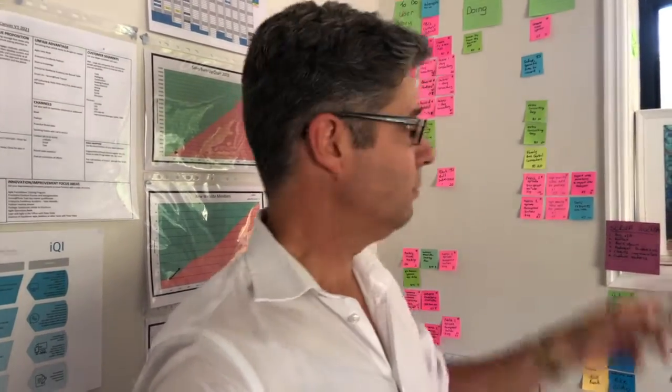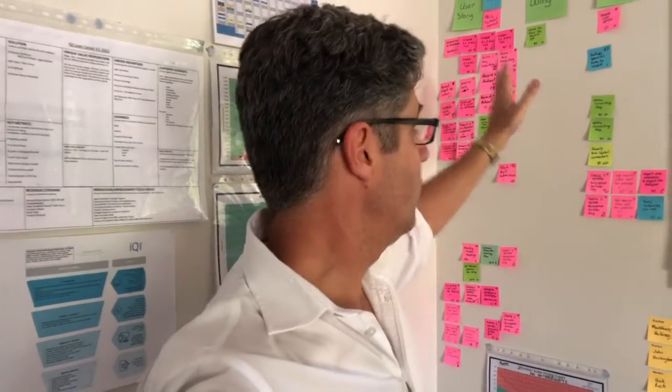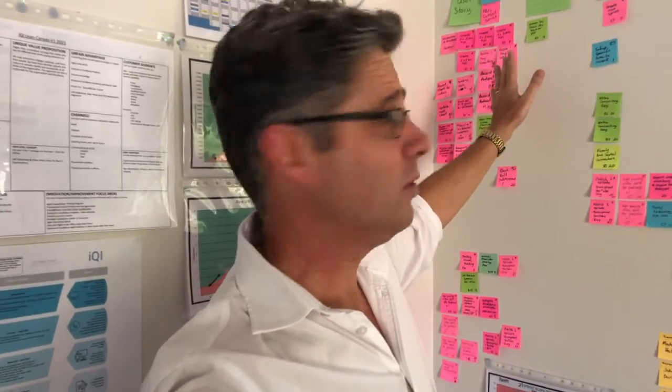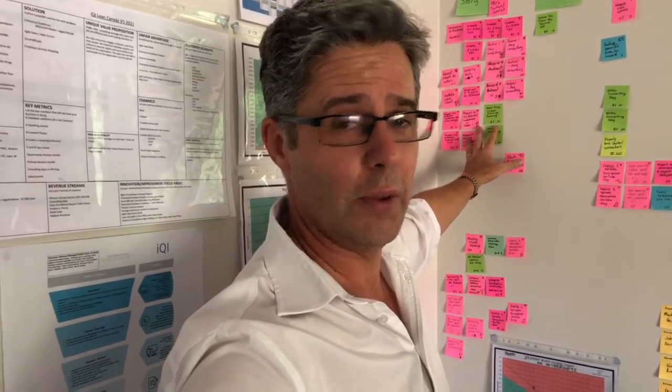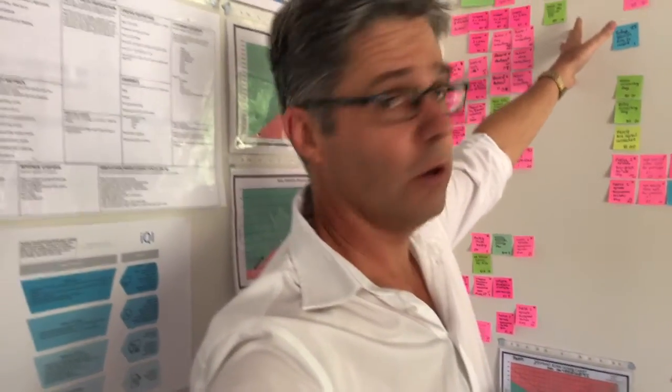And the key thing I find is that teams like sales or operations are looking at how do I run Scrum effectively when it comes to my backlog. So the basic concept of Scrum: you have a set period of time, what's called a sprint, where you're looking to get some work done. You create a to-do or a backlog of work you're going to do in that time, and you gradually move items across to doing and then done and work your way through.